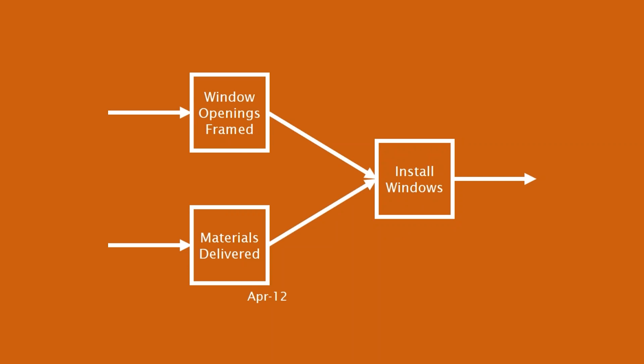Why? Logic is more important because dates shift all the time. As we progress our schedule, dates shift, as we encounter change requests and whatnot, dates shift all the time. So having that logic is going to keep that network and that order together. Without that logic, we don't have, we just have like a checklist. We don't have a schedule.